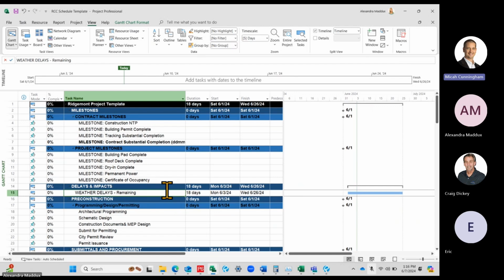The alternative to a bank would be to have Saturday makeup days, but that's risky because if it rains on a Saturday, you don't have that. Is there anything that you want to add to that, Micah? The idea is that we are already projecting the amount of days that we're going to lose for rain. If we don't project that from the beginning, then we're already going to be behind, because we're going to lose days for rain that we have to eat based on our contract.